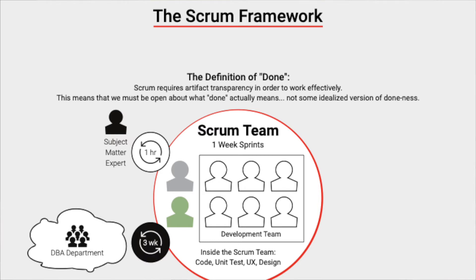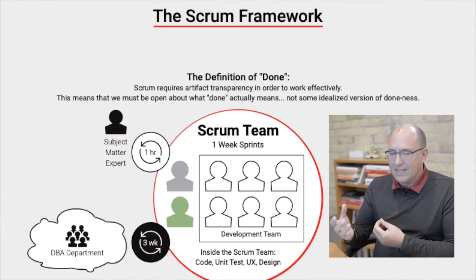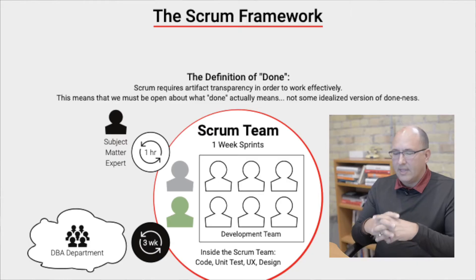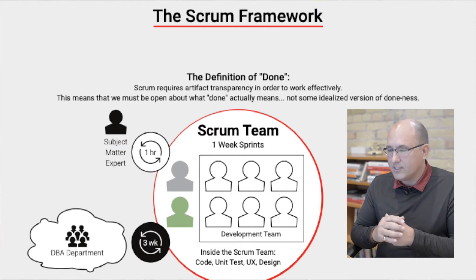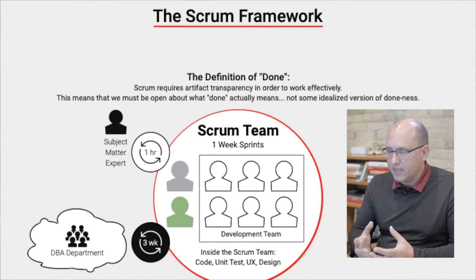There might be other things outside the team that aren't as good. In software development in large organizations, there's often a separate DBA department for database administration. Your Scrum team doing development needs to ask that department for changes to the database, and that department has a three-week-long service level agreement. This means that if the team needs database changes made within a sprint, it's not going to happen — it'll take a request and three weeks, possibly pushing into the third sprint after the current one.